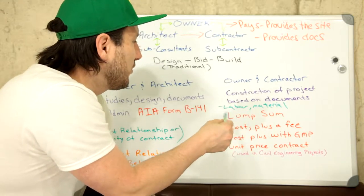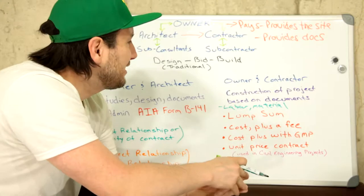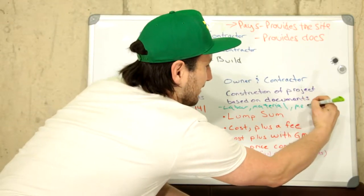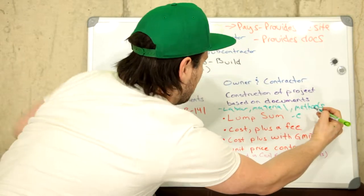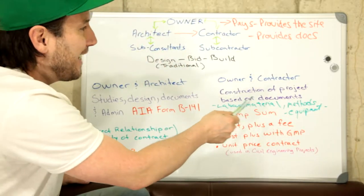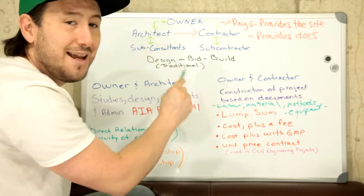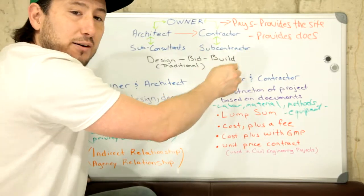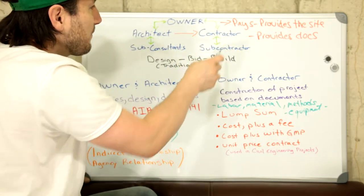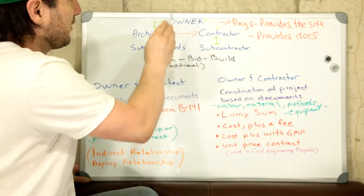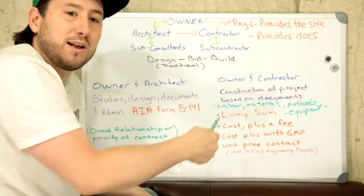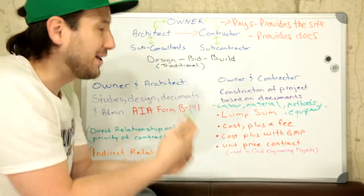The contractor will supply all the labor and materials to build the project. They're also going to provide the project sequencing and arrange the methods and practices for delivering the work — including what equipment is used. The contractor is responsible for paying for everything inside the construction project. The owner doesn't directly pay the subcontractors; the owner pays the contractor one payment, and the contractor then divides it up between equipment, labor, materials, subcontractors, rentals, and all that.